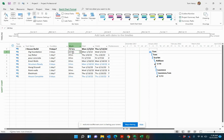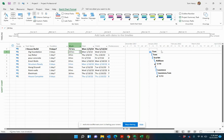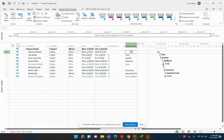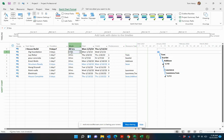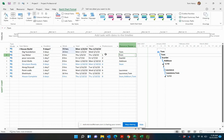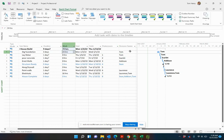Is that what I said? Maybe my math wasn't working. That's why we have Microsoft Project to help us. You can see three days, 24 hours. That's with one resource. If I actually take that resource off the task, you'll see the work goes down to zero hours. That's because no one's working it. It's just a duration. There's no work going on. So when we add a resource, by default, that resource is working full-time on that particular task.